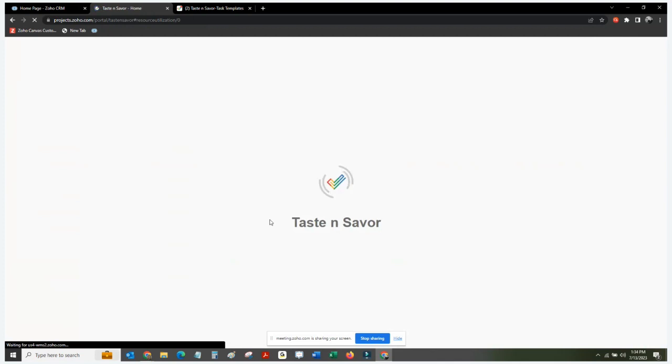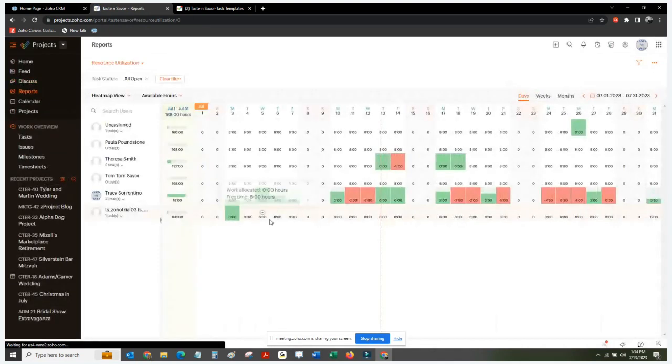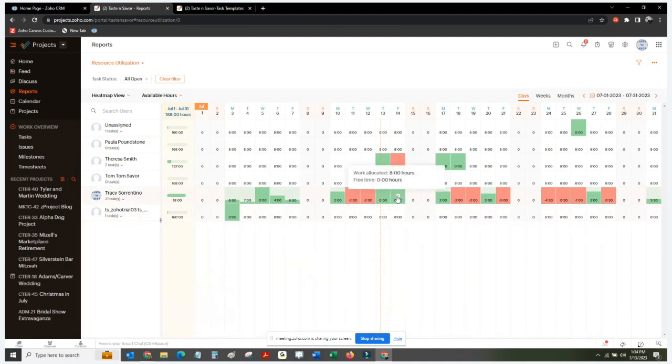When I refresh the screen, you're going to see that now I'm not over allocated, but now Teresa is over allocated. So maybe that wasn't the best place to do that. Maybe I could assign that to Paula or Tom. But that's how you can do that.